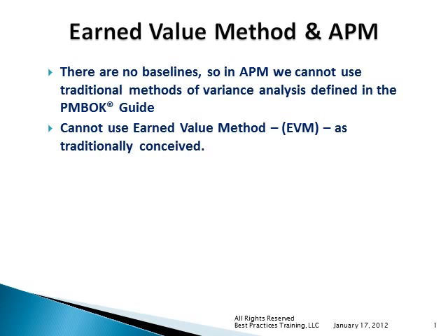Well, let's put it this way. We don't do them for the project overall. Within each sprint, we do have baselines, right? Each sprint is 2 to 4 weeks, so we definitely know what the schedule is for the sprint. We know we've got a dedicated team of 7 to 8 resources, so we probably know what our costs are, labor costs, tools and equipment, so we probably know the cost for each sprint.